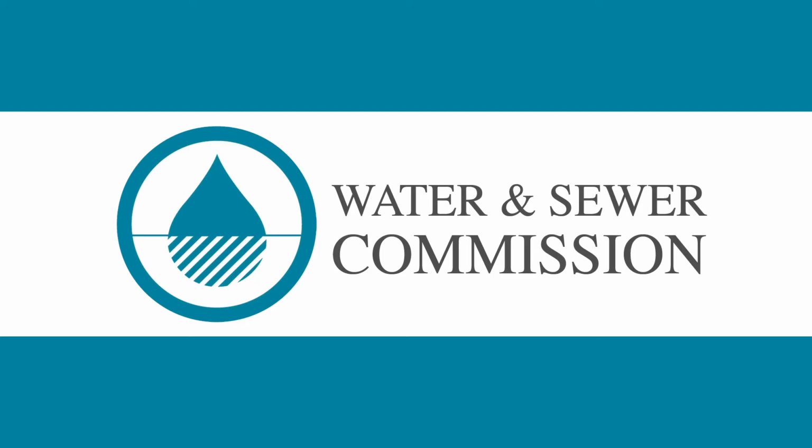Thank you, Tyler. Is there other stuff at the treatment plant, or you were saying not too much has changed? There's not really any major updates from what I had told you, but I just realized that I went to the site since the last commissioners meeting. So I met on site with the GC. We went through the punch list. They had pretty much completed the majority of the work that they had on their list. There's a couple outstanding items. I know Derek and the GC are coordinating with the town's locksmith to try to get everything keyed. There's a few little minor things, but the majority of the work that the GC is responsible for is complete.